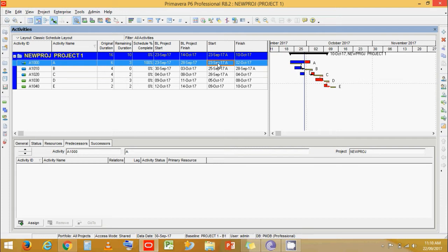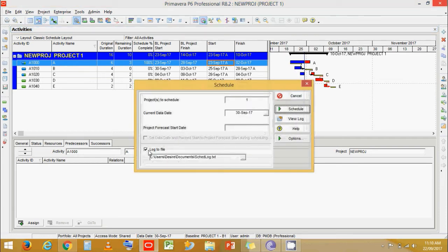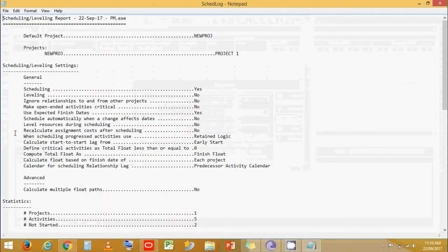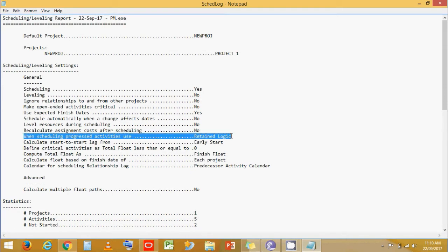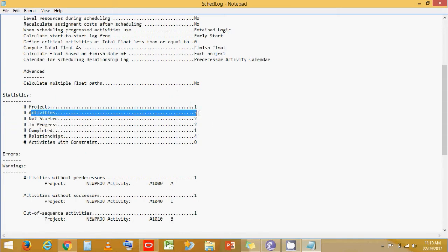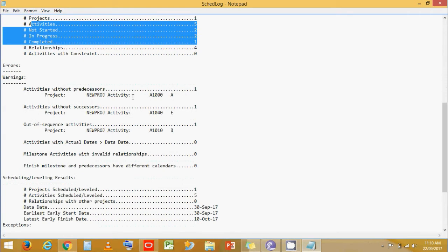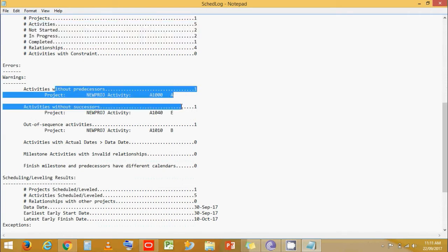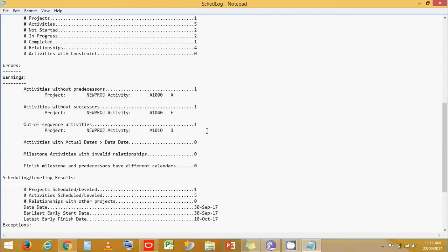How do we know which activities or how many activities are out of sequence? If you go to Schedule, you can see a checkbox for 'Log to File'. Keep that checked and schedule it. Then go to View Log — you can see information like the scheduling method chosen, number of activities, activities started or completed, and activities without predecessors or successors. Here we can see that activity B is out of sequence, and we can count the number of out-of-sequence activities.